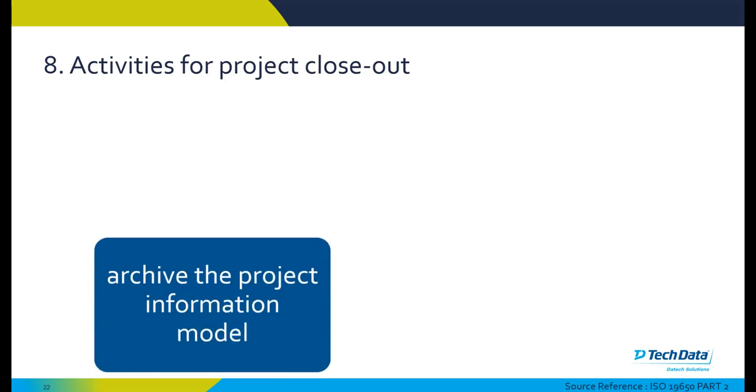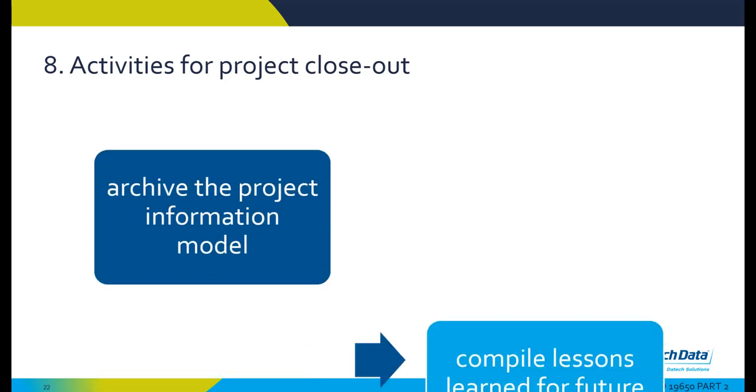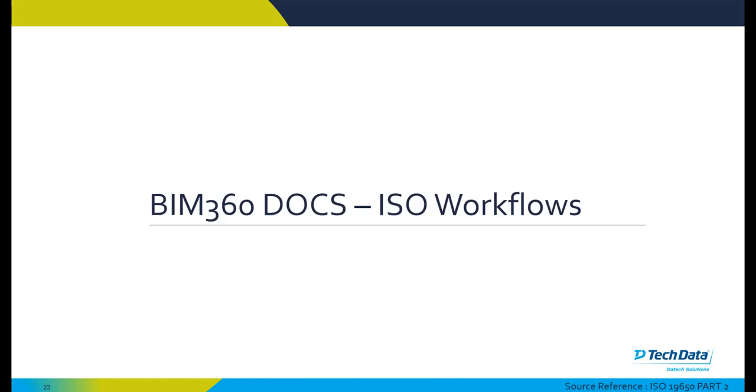At stage eight, project closeout: archive the project information model and compile lessons learned for future projects.